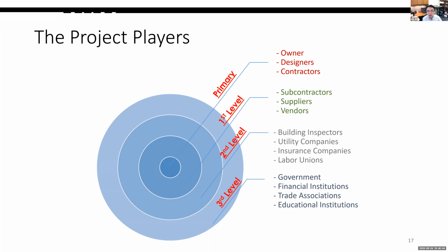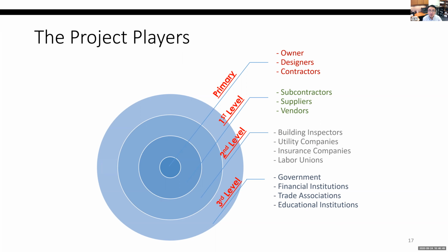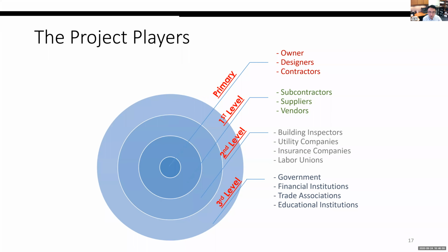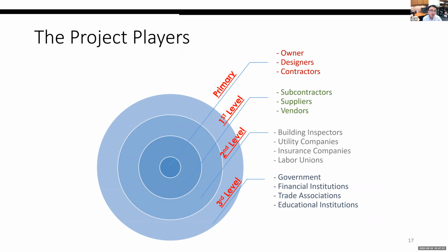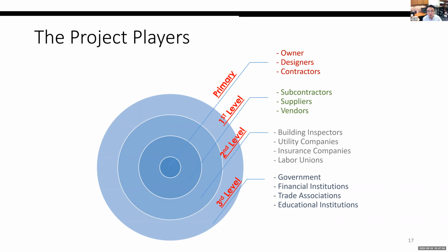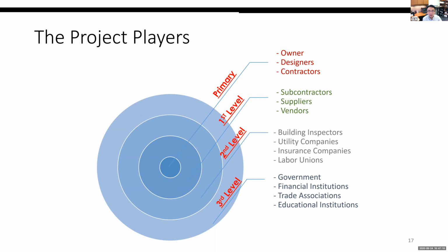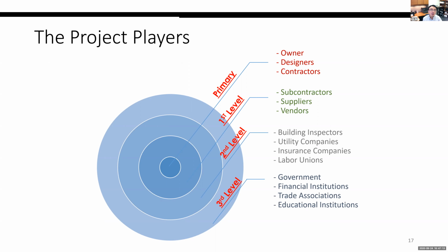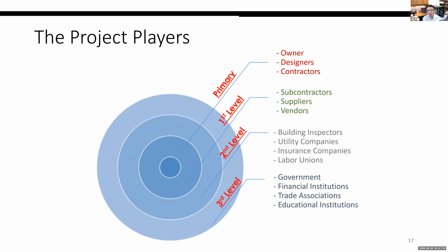And most general contractors in the United States don't do a lot of work themselves. So I have to say, for most of the commercial projects, the general contractors outsource about 90% of their work to subcontractors. That's probably why their profit margin is very low, because they are sharing profits with the subcontractors as well. So a lot of the general contractors only do concrete, and they subcontract the frames, the windows, the doors, especially drywalls, lighting, and MEP to different subcontractors.